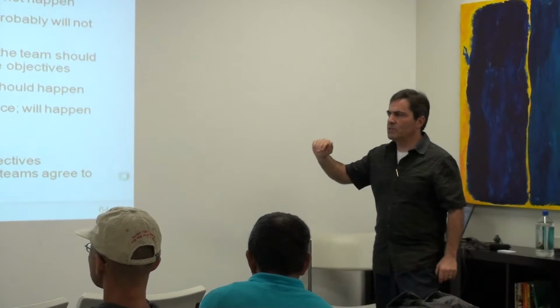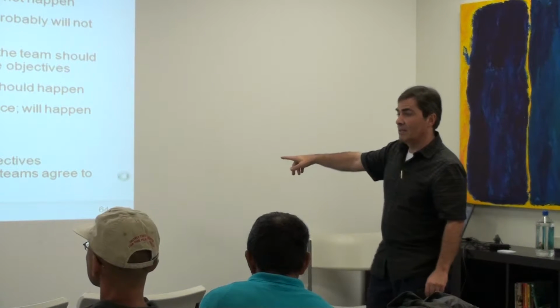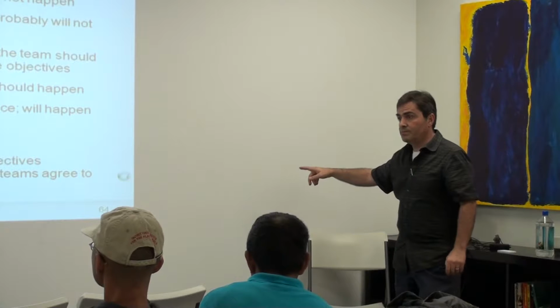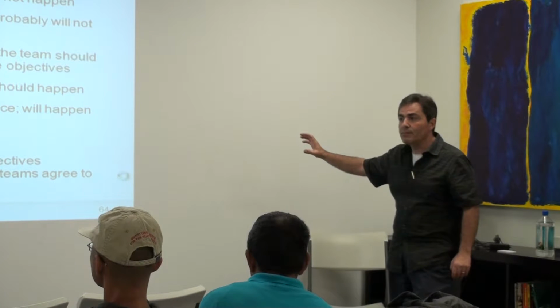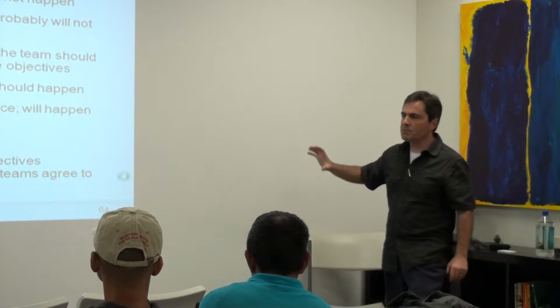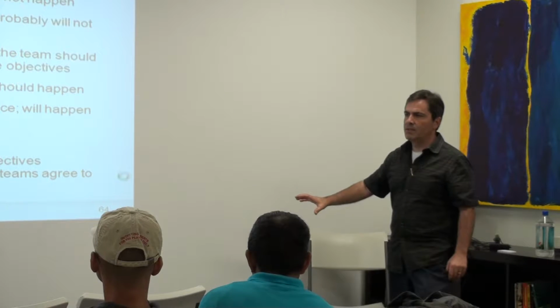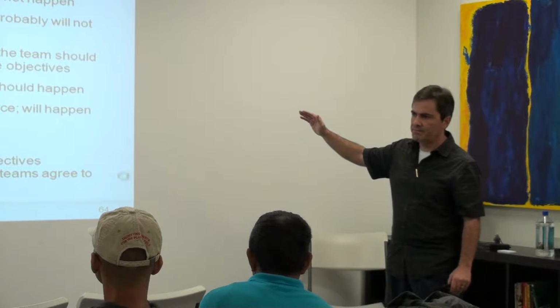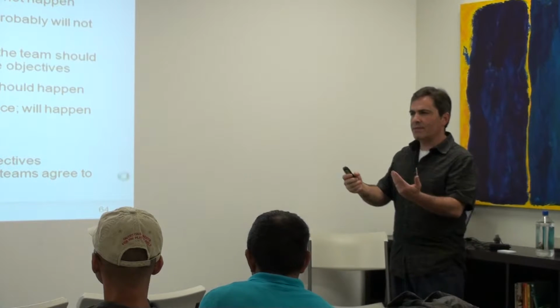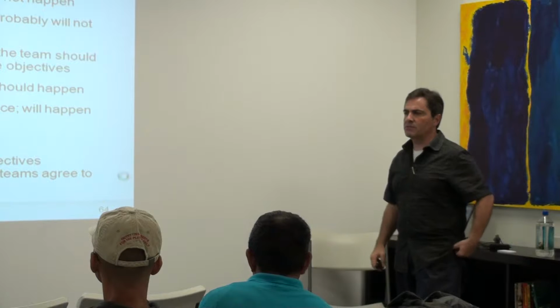And so what the teams will do is they'll draw a line and say, okay, this is our stretch goal. We think we'll be able to meet these, but we're not committing to it. And they'll move those items below that line. And so the commitment is for everything above the line. So that's how they break through that sort of a barrier.